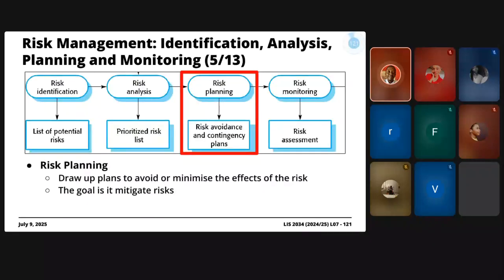And then afterwards, it's risk planning. Risk planning here is you're coming up with concrete plans, right? To either avoid these things you've identified as potentially affecting your project from happening, or minimizing their effects. Now, if you think about it, there are certain things that you can avoid, and certain things that you cannot avoid. They will happen, but you minimize. You see, you can't avoid.